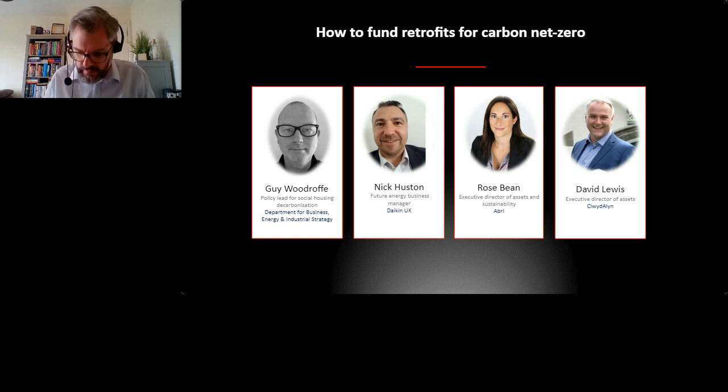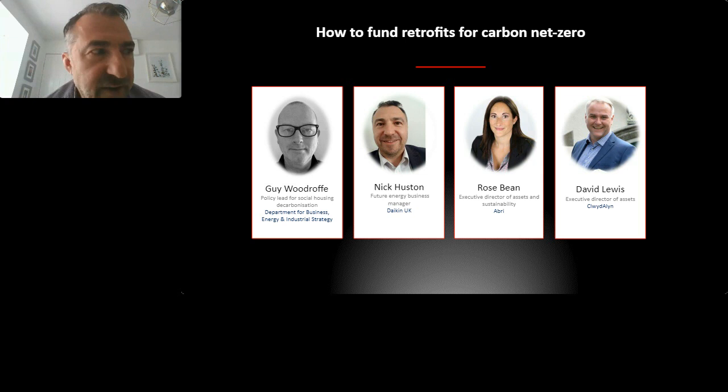Yeah, some great questions coming in there. I was just reading them all as they come in. So on the listed heritage buildings one, that's a good point. We do install lots of heat pumps into conservation areas and heritage areas, and there is a way around it. We have lots of discussions with planners, and we can do training with planners if need be. The simple answer is we've got a product called a split system. What this means in basic terms is that it doesn't have to be on the building.